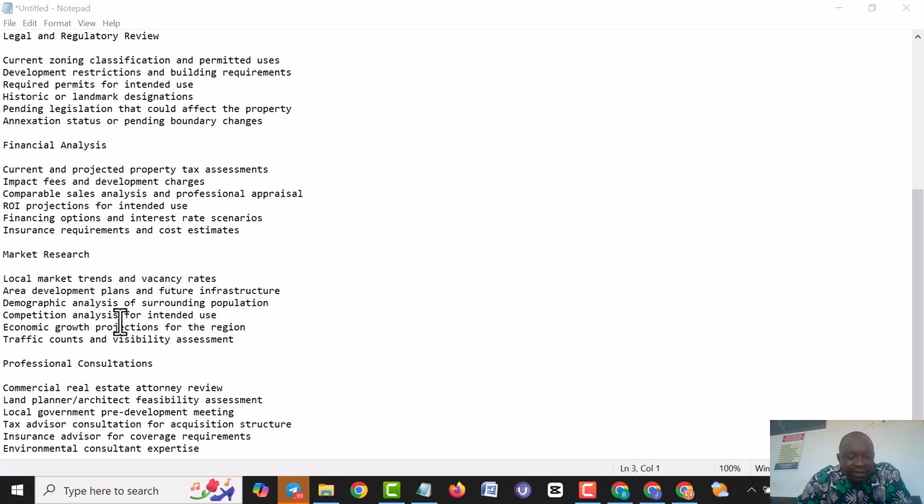After this, last but not least, we have professional consultation. That's where we'll be talking about commercial real estate attorney review, land planner and architect feasibility assessment, local government pre-development meeting, tax advisor consultation for acquisition structure, insurance advisor for coverage requirements, and environmental consultant expertise.